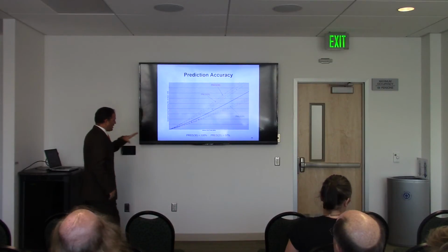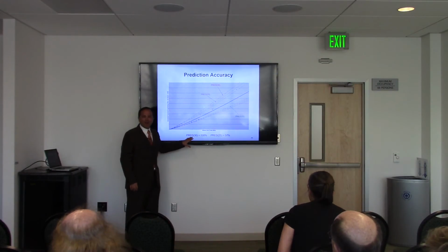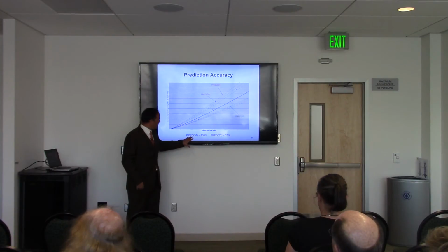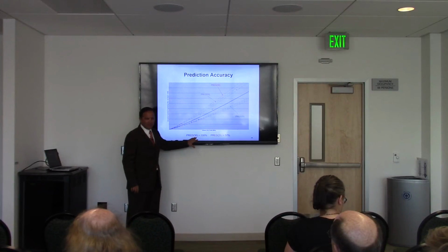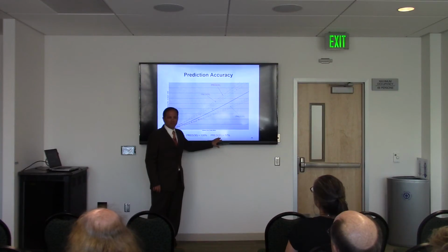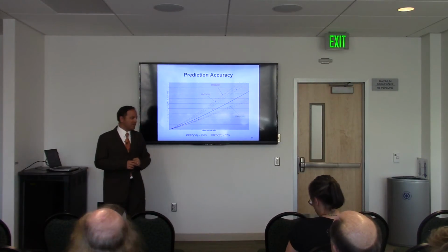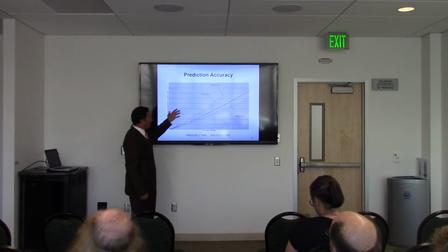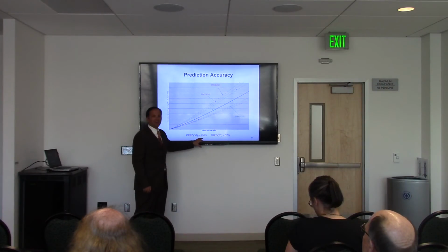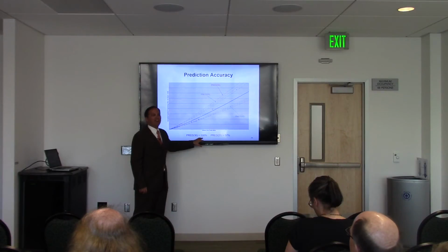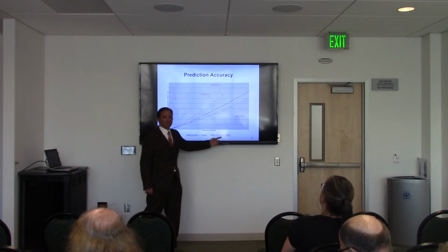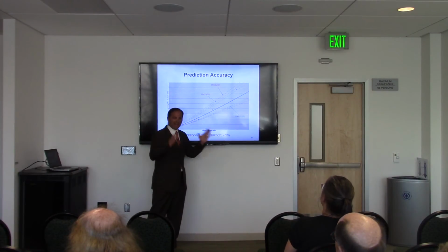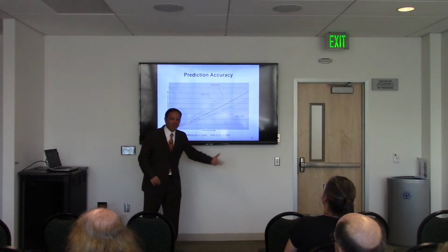Now, one way that we quantify how noisy or uncertain the model is, is we use these PRED criteria. PRED 30 essentially means plus or minus 30%, PRED 25 plus or minus 25, and then I mentioned earlier the plus or minus 20 criterion. I won't go into the details, but essentially the model that I'm showing here has a PRED 30 of 100%, meaning that 100% of the time it gets within plus or minus 30%, right? But notice how quickly it drops. And if I were to add an even more stringent criterion, it would drop even farther, right?